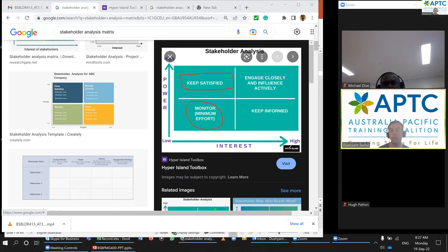Up here, they have a very high interest, but they don't have any power. It could be a customer, for example. They really like to know more about your company, but they don't have any power. So again, don't spend too much time updating them. Just a news bulletin, media, email or marketing channel will do the job. But this is the part where you need to spend a lot of energy and time. They are your company director, senior people, and all those people. Engage closely and influence actively. You need to keep them in the loop in everything that you do.